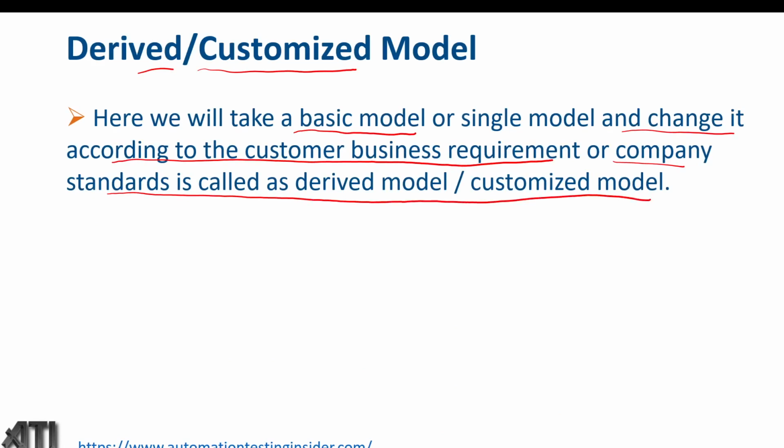In waterfall model, we have requirement analysis, design, coding, testing, release and maintenance. These are the phases of waterfall model. What happens in waterfall model is we cannot go back to the previous phases which are already done. So once requirement analysis and feasibility study is done, we cannot go back and change the requirement. That was the biggest drawback in waterfall model.